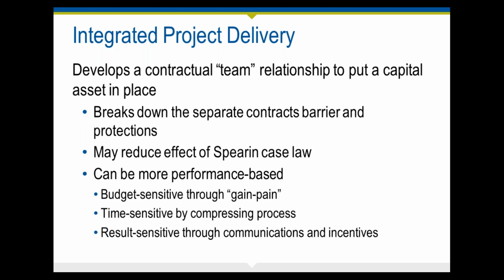Generally speaking, what is intended to happen is you establish a baseline target for what the project cost and schedule is going to look like. And if the actual cost exceeds that project target cost estimate, that loss then is shared by the parties. If it comes in at or below those estimates, then you are rewarded for that enhanced performance.